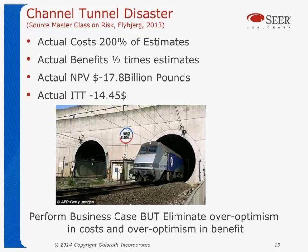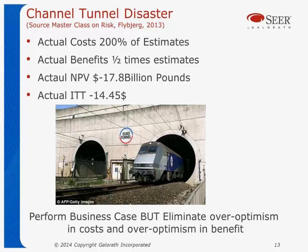There are lots of examples of this. When they were building a tunnel from the UK to Europe, the actual costs were about 200% of the estimates, and the actual benefits were about half. The net present value was about minus 17.8 billion pounds — it cost about 17.8 billion pounds more than it was going to return. But it's interesting: I gave this briefing somewhere in Europe, and they said the original estimates were over twice as much — they were told to cut them because it wasn't cost-effective with the estimates they had. Well, they cut their estimates, and the result was a disaster.